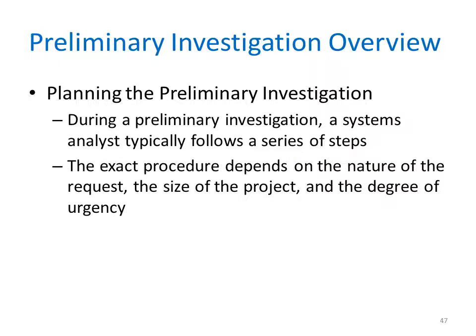During the preliminary investigation, the systems analyst typically follows a series of steps. The exact procedure depends on the nature of the request, the size of the project, and the degree of urgency. Step 1 is understanding the problem or opportunity. Step 2, defining the scope and the constraints. Step 3 is to perform fact-finding. Step 4 is to analyze project usability, cost, benefit, and schedule data. Step 5 is to evaluate the 4 parts of feasibility that we've talked about: operational, technical, economic, and schedule. And step 6 is to present the results and the recommendations to management.